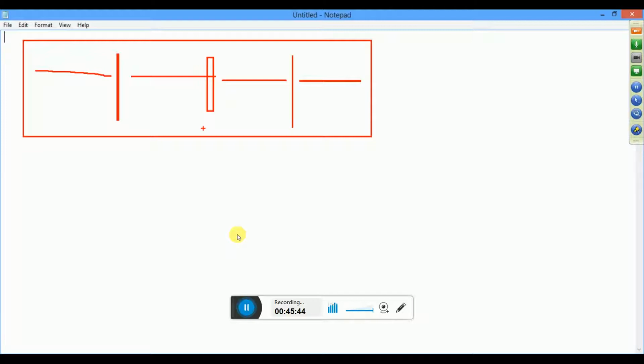After 4 to 5, if possible, there should be a tester to test it. Now these are three very simple things we are taking. Who is going to talk to the development team manager to ask whether the code is going to be ready? Somebody has to talk to the middleware team manager. We need a person to deploy this application from 4 to 5. It's not that they can send it anytime and somebody will be available, right? People might be busy in other projects. Then somebody has to talk to the testing manager and say, the deployment will be finished by 6 o'clock, will there be somebody to test it? So this coordination needs to be done by somebody.